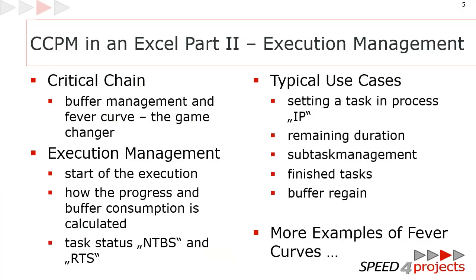Now we are at the execution management. It's all about the buffer management and the fever curve. And the fever curve is the game-changing element of critical chain because it visualizes the progress and the buffer consumption, and the team is managing every day according to this.